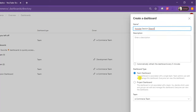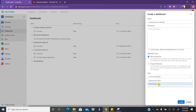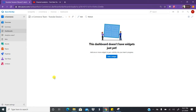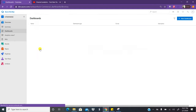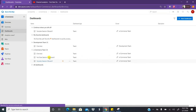There are two types of dashboards. One is a team dashboard — this dashboard will be associated with a single team. For example, in your project you may have multiple teams: testing team, development team, business analyst team. If a dashboard is assigned to a testing team, that dashboard will be visible only to the testing team. If you assign the dashboard to development team, that dashboard will be visible only to the development team. For now let me select team dashboard. I have one team called e-commerce team. Let me select e-commerce team and click on create. As soon as you click on create, your dashboard will be visible.